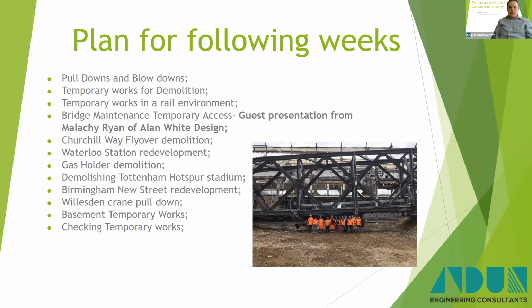My view is they have to be competent, and it depends on what they're involved with. It's a very, very difficult one to answer, I think. If you're on a greenfield site and you're using proprietary items, then the TWC doesn't need to be as experienced as someone who's checking items that have been Cat 3 checked, so they're unusual, they're unique in their design.